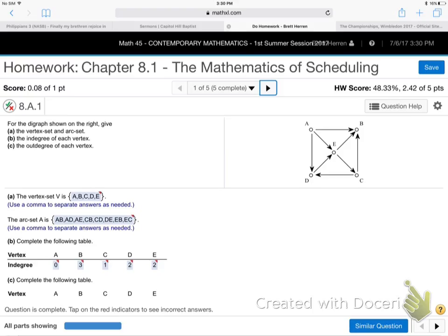So the construction manager comes in and says, all right, I need to hire the roofer, the plumber, the person that's going to lay the foundation, the people going to put up the walls. All right, I'm going to call the roofer first. Come on over, roofer. Get going. Well, that's the problem, huh? The roofer can't be coming over to do his job until the walls are up, and you can't put the walls up till the foundation's laid. You can't do the foundation unless they put the plumbing in the ground first.